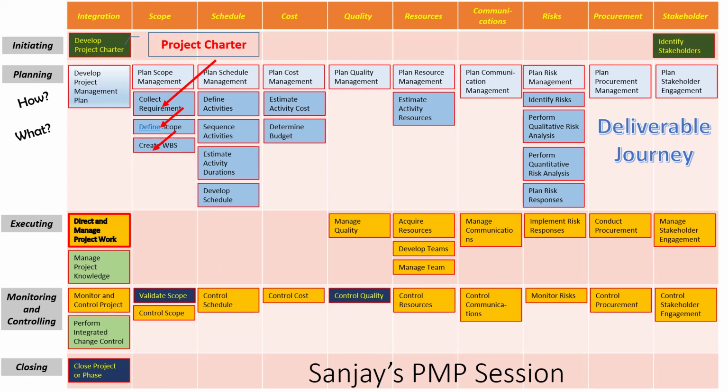So you may not have heard those words, but that's how it happens. Remember, the charter at a broad level is only saying that we want to implement a customer relationship management system in the next 6 months. We are estimating around 40 lakhs INR. That's what is in a project charter. Now, that's not good enough as a requirement. Implementing the customer relationship management system is sort of a wish list, a big dream. Now, that big dream needs to be broken into requirements.